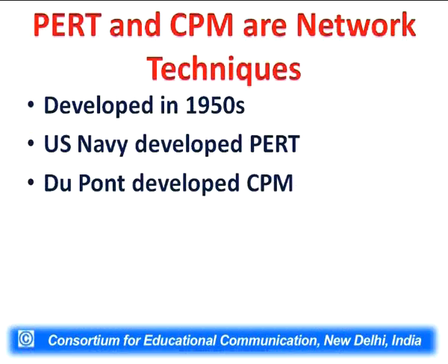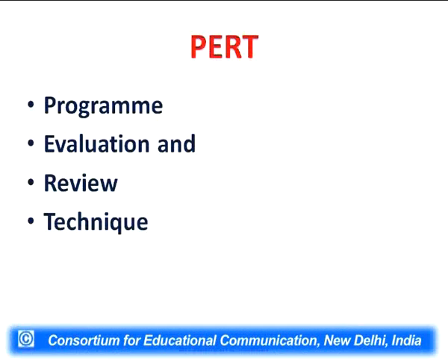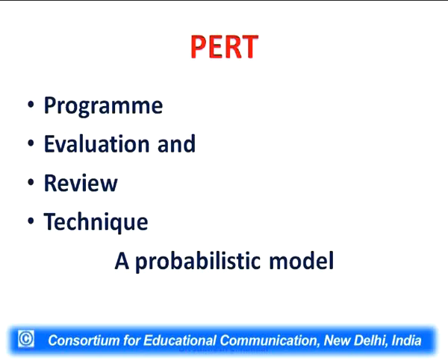I have already told, during the 1950s, US Navy developed PERT and DuPont developed CPM. US Navy wanted to launch the ballistic missiles. So they developed a PERT technique, which is a network technique. Full form of PERT is Program Evaluation and Review Technique, and this is a probabilistic model. What do I mean by probabilistic model? Activities and their timings are not exact.